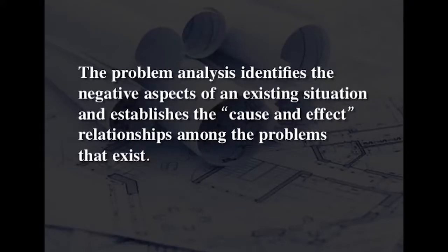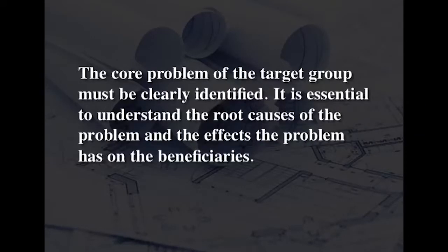Analyzing the problem. Every project aims to help to solve a problem that affects the target group or groups. The problem analysis identifies the negative aspects of an existing situation and establishes the cause and effect relationship among the problems that exist. The core problem of the target group must be clearly identified. It is essential to understand the root causes of the problem and the effects the problem has on the beneficiaries. This can be represented diagrammatically by constructing a problem tree. The causes are structured by clustering similar ones and by developing a hierarchy of causes.